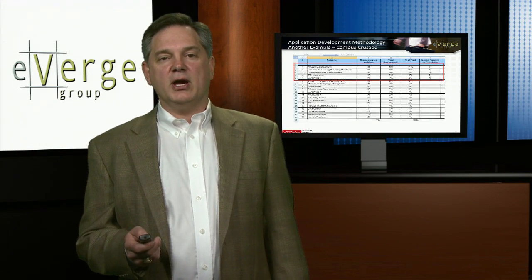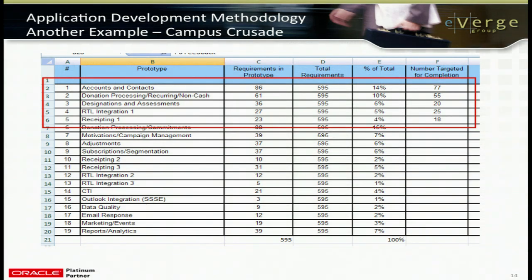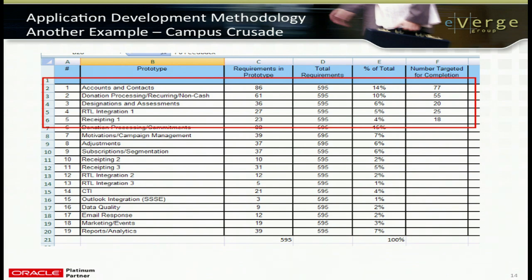Another example from one of our CRM clients: we broke it down into about 19 different work streams — 19 different prototypes that were work-streamed. For each, we've documented how many requirements are in that particular work stream, and as a percent of the total, which ones are targeted for completion in that prototype. It's key to kick off prototype meetings with facts: what are you going to see today, what percentage has been fulfilled, and give the handout that shows which ones are actually fulfilled.